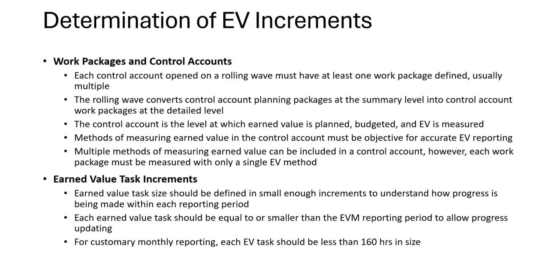Earned value task increments. This is within the work package, when you need to define small enough increments to understand how progress is being made within each reporting period, which is usually a month.